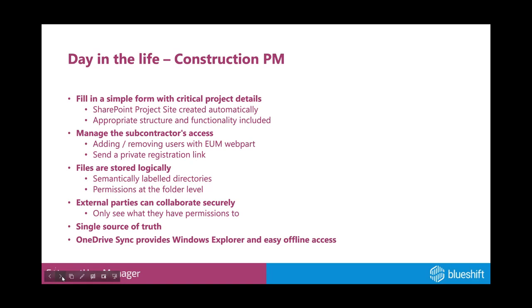Specifically because they were empowered through this migration and through the new tools and functionality they had between SharePoint Online and EUM. They were really empowered to start and move their projects forward in a way that they just didn't have before. So they were able to fill in a very simple, guided form through the provisioning solution where they could enter all their critical project details, like whether a team was required for this project, if they needed to use Microsoft Teams, if they needed to have external access to this site at that point in time. All of that information would automatically create a listing in the site directory for navigation and create a SharePoint project site based on the template, with all the appropriate structure and functionality already included and ready to go.